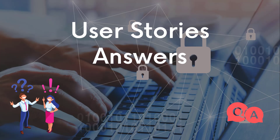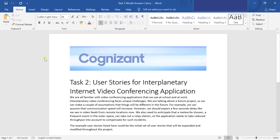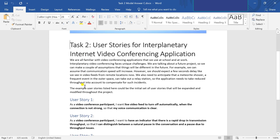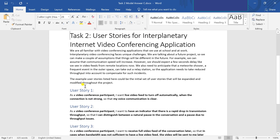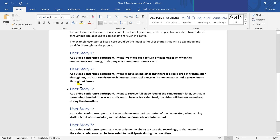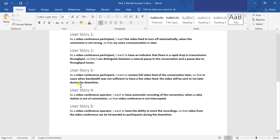The second task is User Stories. In this task you have to interplay an internet video conferencing application. We are all familiar with video conferencing applications that we use at school and work. We need to tell the user stories that could be an initial set of user stories expanded and modified throughout the project. For example, as a video conference participant, we want the live video feed to turn off automatically when the connection is not strong, so that voice communication is very clear.